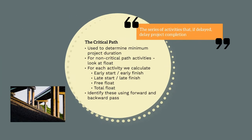The critical path is the series of activities that, if delayed, delay project completion. When we analyse and optimise the schedule, these are the activities we will be paying particular attention to and most likely look to alter and change the delivery methodology to optimise the schedule. Activities that don't fall on the critical path will still have some potential to fall on the critical path and risk delaying the project — maybe even something as simple as landscaping on a building project that can be started early and doesn't take very long.